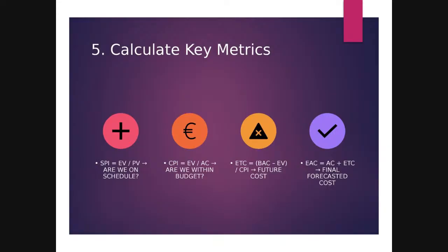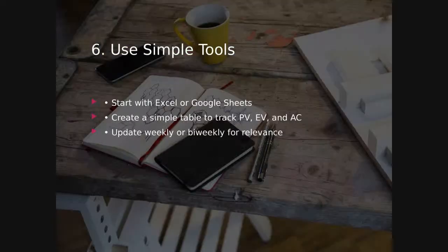If the team is being honest and the estimate to complete has been done from the ground up, bottom up ETC, not using the EAC equals BAC over CPI, but this one, and they really go down to the granular levels, you'll be able to find out how likely it is for your team to blow past the budget. Just like in the example I gave, EAC was 64 and the BAC was 40. Now scale that up into the millions and you can see how useful this is.